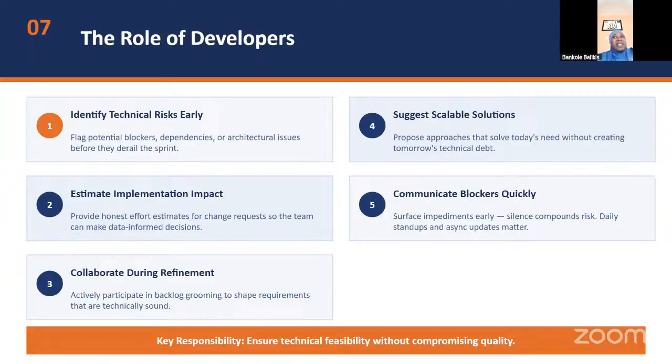Okay, fine, it is needed, but let's prioritize. Let's do the one that is needed, that the users will be able to use, and communicate blockers quickly. If we have to do this, it's going to delay our timeline and delivery as well. So let us do the ones that we have now, work on these features, and then we can add others to the next phase.